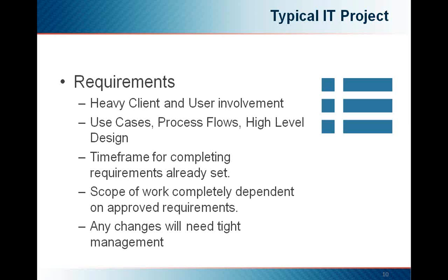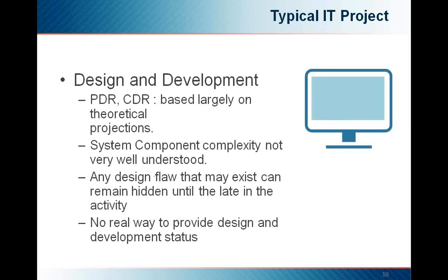define the entire solution and document this clearly, and we actually need to do this at this point in a limited amount of time. The requirements are developed and approved based on how the system can be described at this particular time frame. Once the requirements are approved, they're done, finished. Any changes now will require tight management.